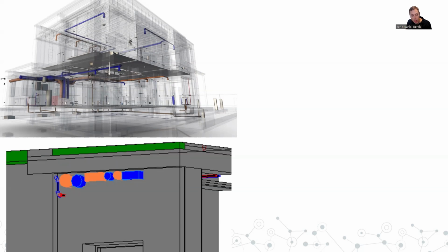And when I showed them this picture, that there are going to be big pipes going through a load-bearing wall, they realized that they need to redesign their solutions. That resulted in an additional couple of weeks. A completely different structural frame was created to support a large opening.